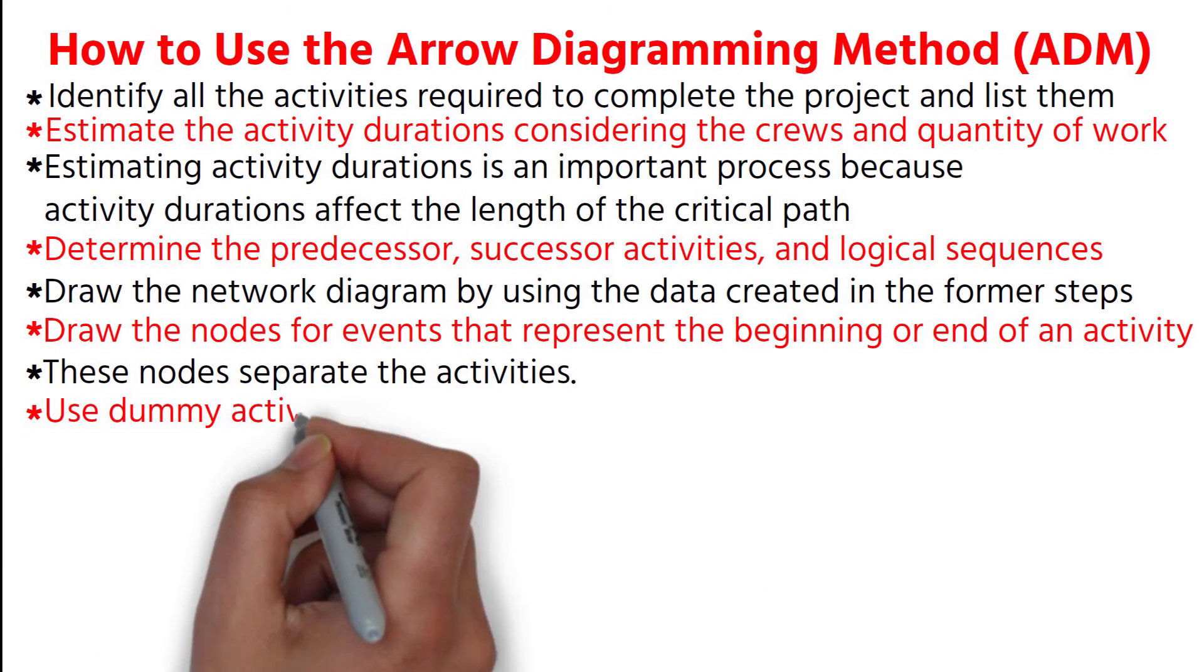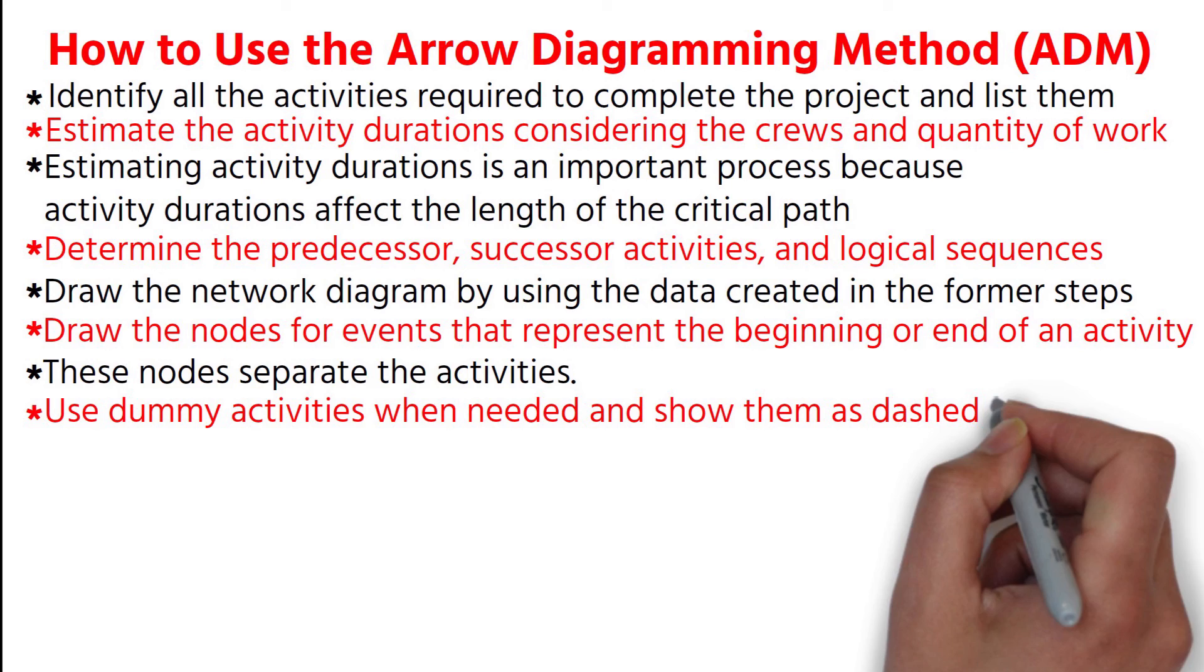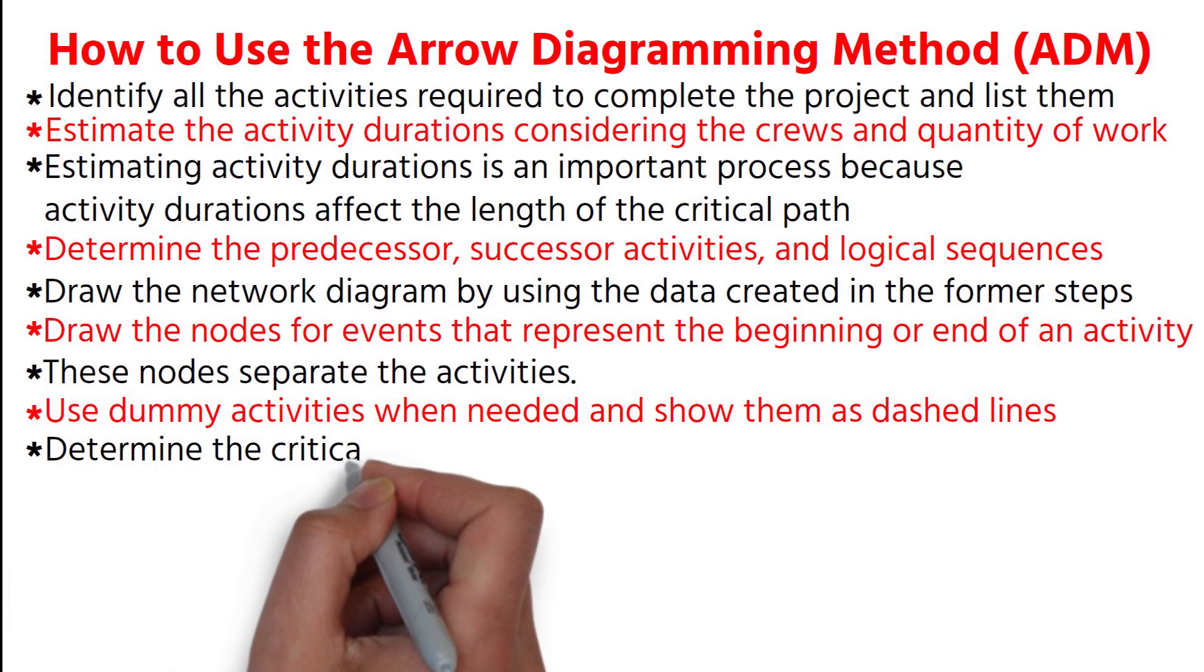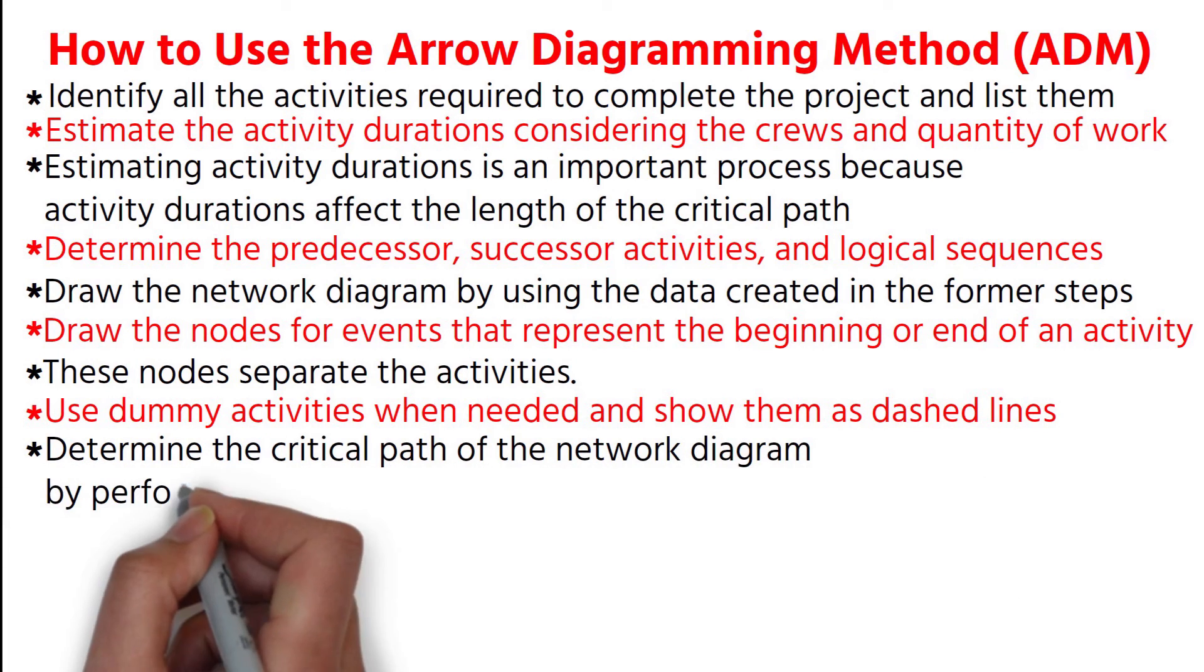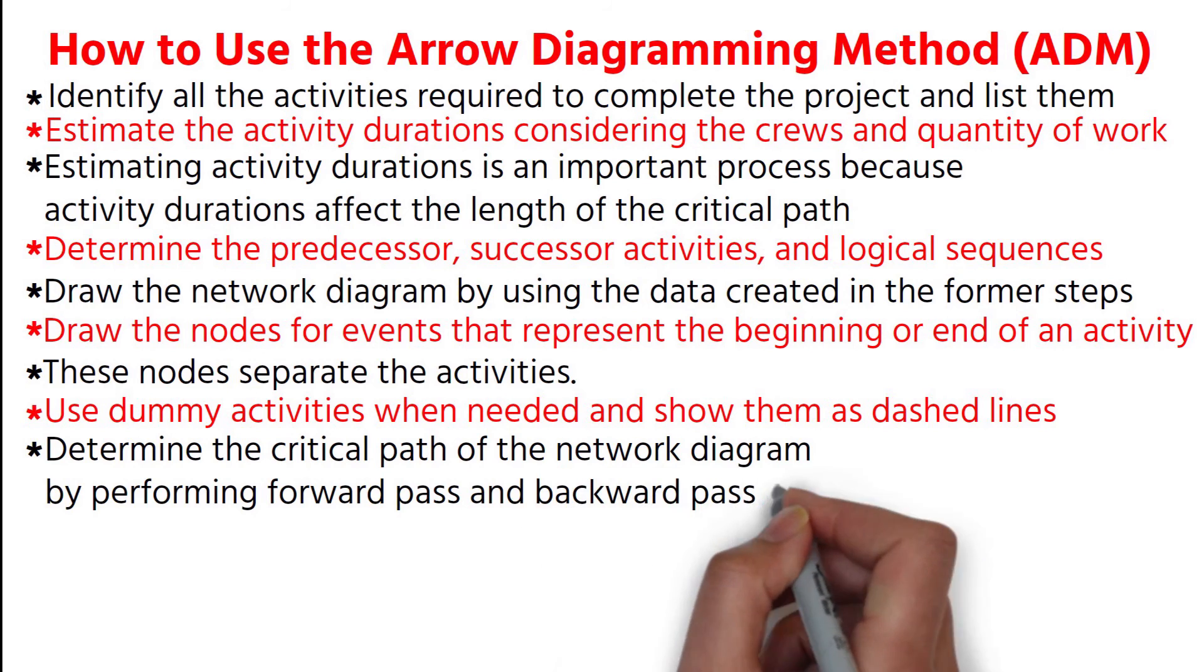Use dummy activities when needed and show them as dashed lines. Determine the critical path of the network diagram by performing forward pass and backward pass calculations.